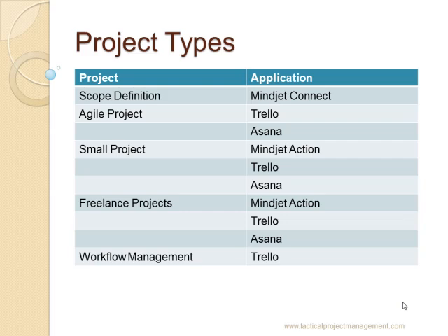So very similar to the PDU podcast. You have a set of repetitive tasks that you run each month, and those can be set up within the Asana tool. You also could do that with Trello, where you have your lists that indicate what you're working on for the year or for the month. Each of those podcasts shows up as a card that moves across those different phases. And you use the checkboxes in Trello to track whether you have actually completed that specific task for that podcast.